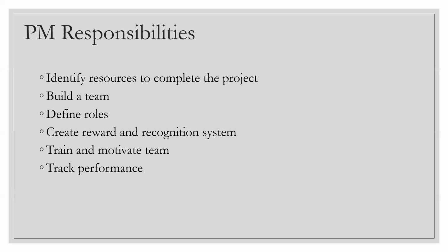Once they know that, then they will be hiring. Since they are not the functional managers, they will not be opening a requisition and hiring. Hiring in the sense that they will get the people onboarded to the project team. That can happen from the existing teams in the company. They will reach out to different functional managers and say, from the engineering team I need two people for the project, from the project management team I need one person, from the architectural team we need one person, and so on and so forth.